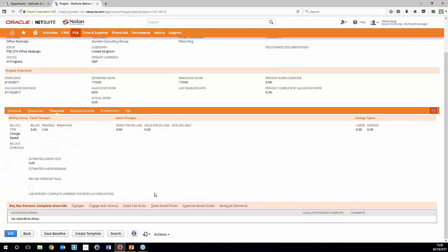And from here you could have either created the rules with the projects, or just as equally, we can create specific time-based and specific expense-based rules depending on the project. So this is how and when both time logged and expenses logged is billed through. So for example, if you wanted to log expenses and you only wanted to bill at the end of the month, you could set up a rule that says once a month calculate charges so that they're invoiced, which is really quite nice.